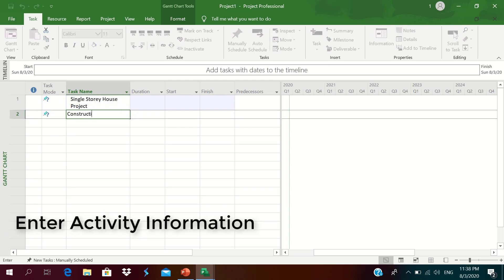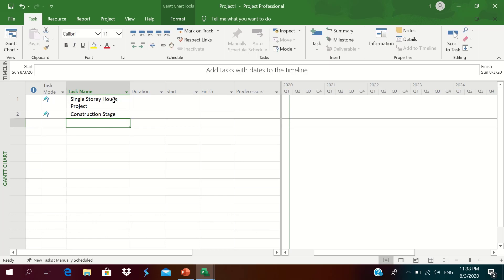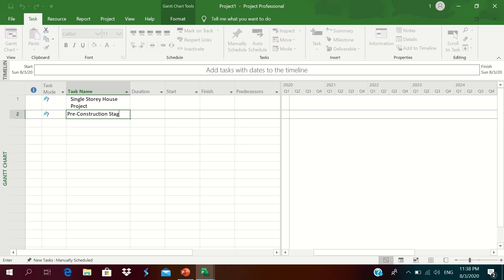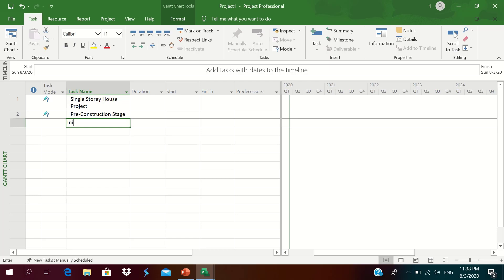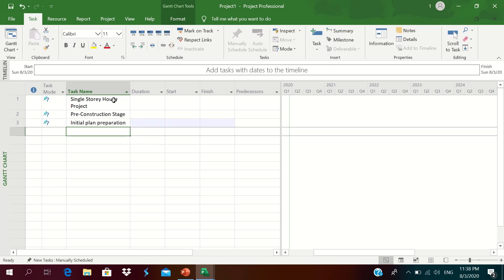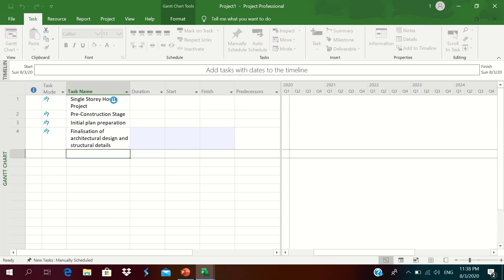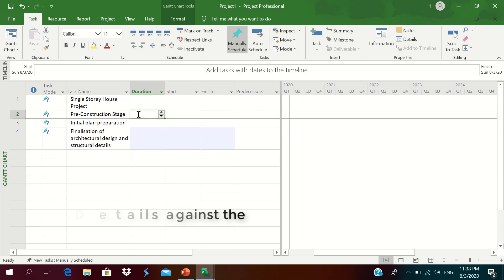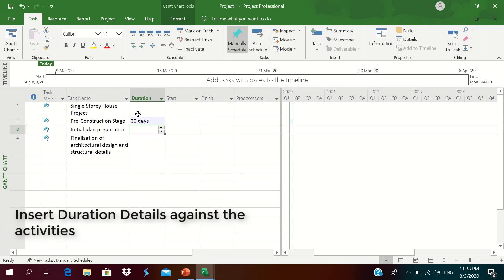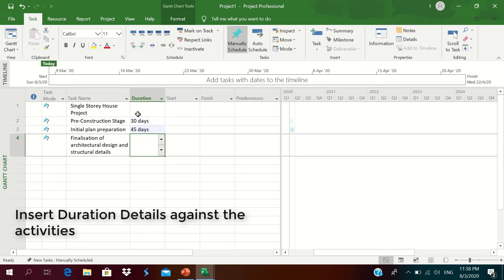There is a construction stage. Within the pre-construction stage we have initial plan preparation, finalization of architectural design, and structural details. We will insert durations against these activities: 30 days, 45 days, and 24 days.